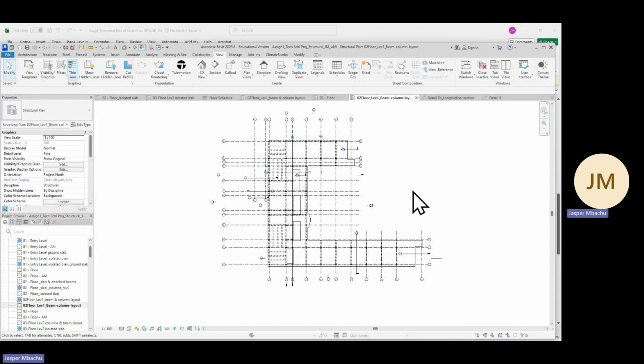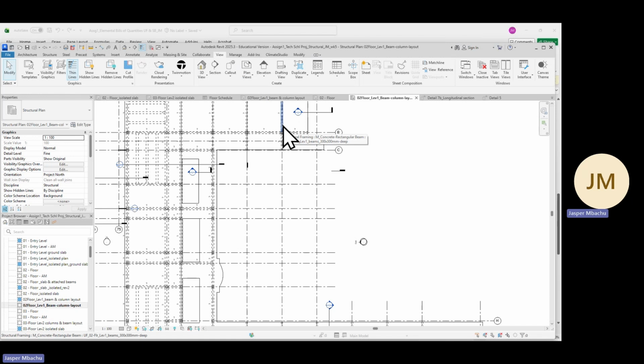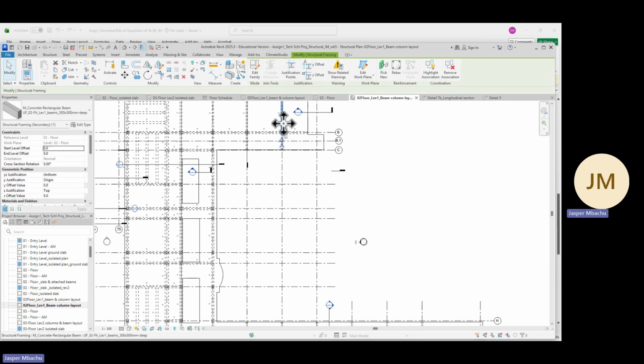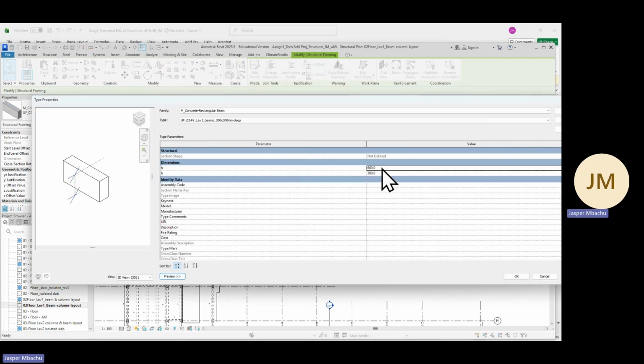Now, what we want to do is, we have 3 kinds of beams here that we want to annotate. The first one, if we click on this beam, and then go to edit type and click on preview, we see the vertical, which is like if we click here, what is displayed is the depth. And I think we've proven that that depth is not the right depth. We have to remove the part that produced into the slab.